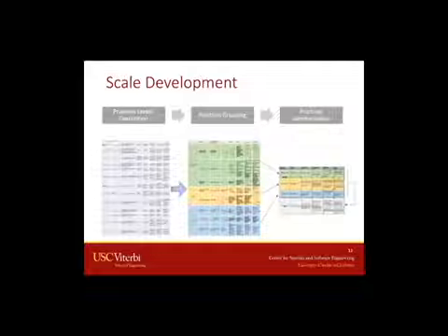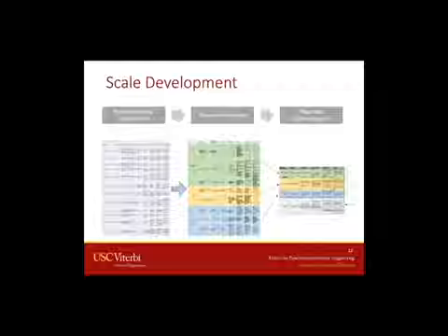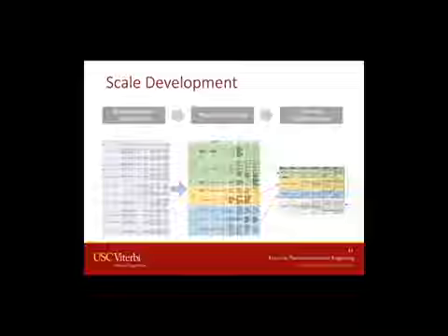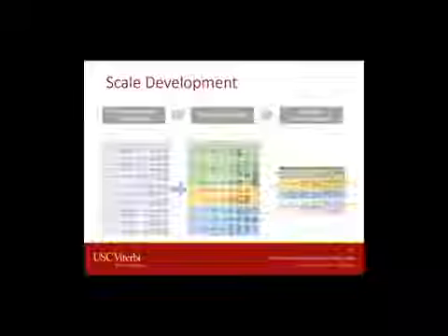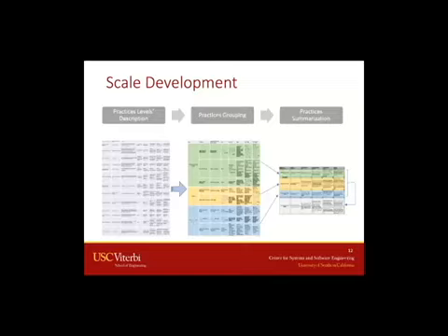for each one of these practices, we described how they would be executed in increasing levels of rigor and coverage. Then we grouped these practices in 3 categories: security requirements and design, security coding and tools, and security verification and validation. And then next, we summarize the practices in each group so we could have a summarized version for the users to easily select the correct level of secure software development.